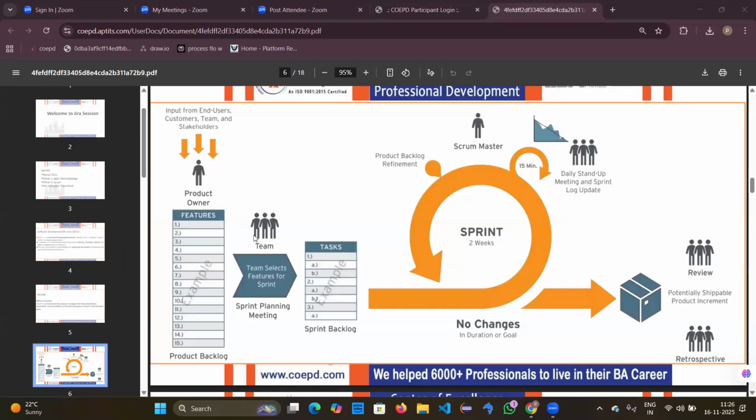A user story is just like a feature that the client wants in this particular project. It is a small unit of action specifying what the feature is about. To mention these user stories, there is a particular format: as a user, meaning whoever is using it, the person is mentioned here. Then I want to, which states the purpose of this feature, so that, which states the functionality that the feature is going to achieve.